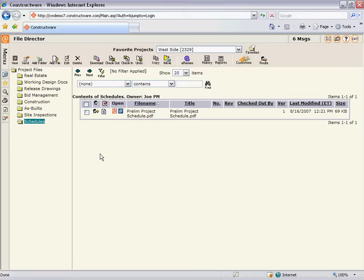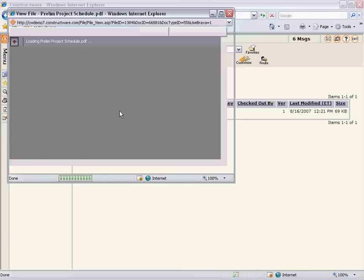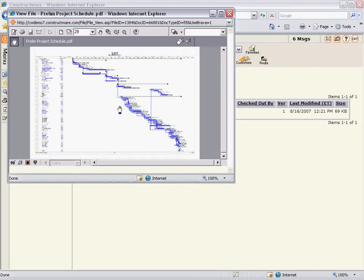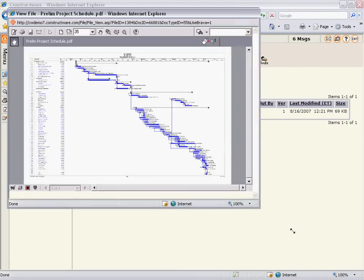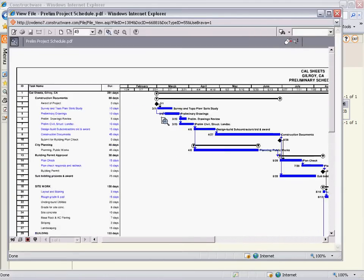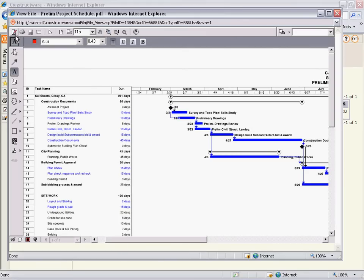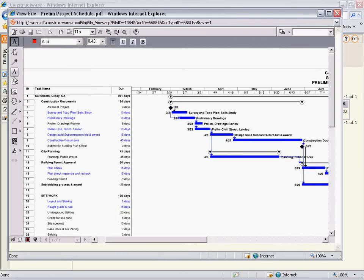An automatic notification is sent out to the users. Those users can then view the schedule directly inside of the application, whether that be a PDF outputted from a schedule application or a raw MS Project schedule. They can print this out or consume the data electronically, and if something doesn't look right, they have the ability to mark it up using the built-in markup tools and point out what they see back to other users.